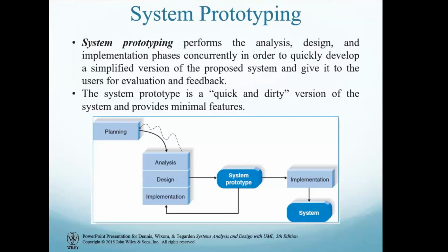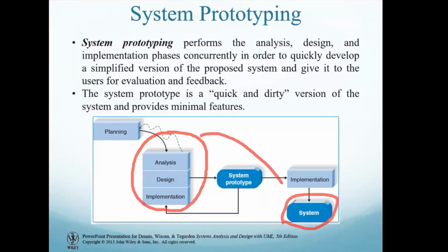Okay, they can quickly decide, no, the login should not be like this, this feature should be like this. So you see, prototyping is used to get the actual requirements from the business or from the organization. So at the first stages, the prototype is used for analysis and design, and later on the same prototype is converted into the full system. Note the point, the same prototype is going into the system. It may be some dummy system, it may be some web based system, but once you get all the information from the user, the same system is converted to the actual system.